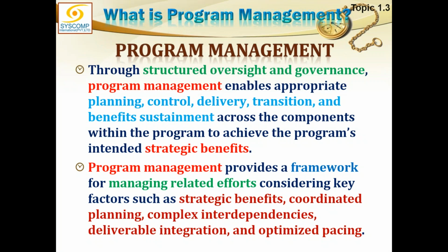So this is not only the benefit, we are talking about the benefit life cycle. We are planning the benefits, how we are going to control them, how they will be delivered, how they will be transitioned, how they will be sustained. Then we plan. This is the benefit realization plan. The benefit realization plan tells me when what benefit will be delivered. So this is my planning.